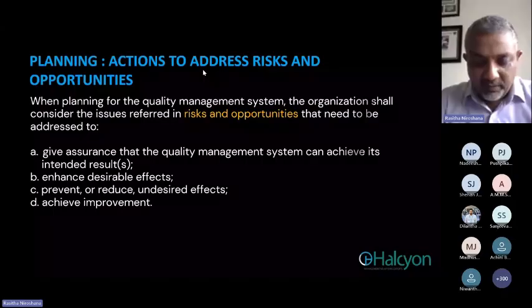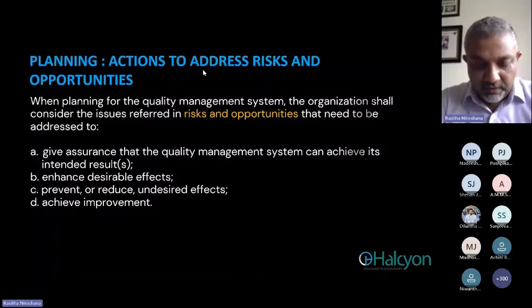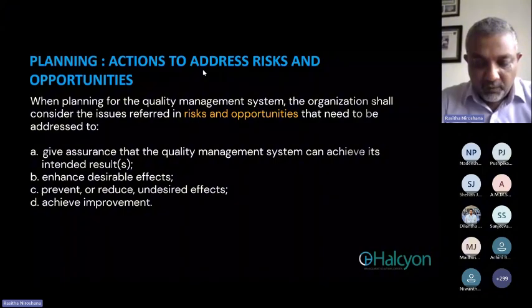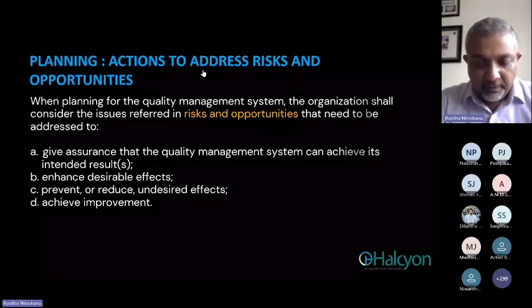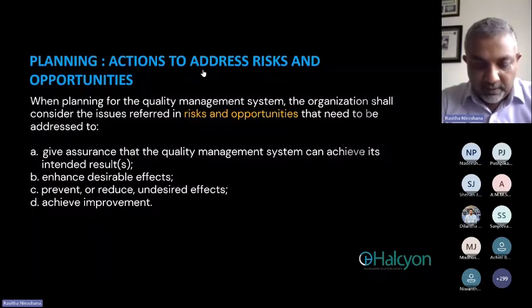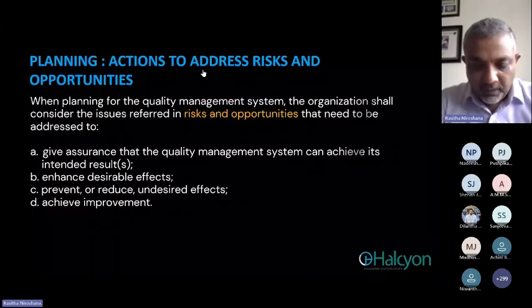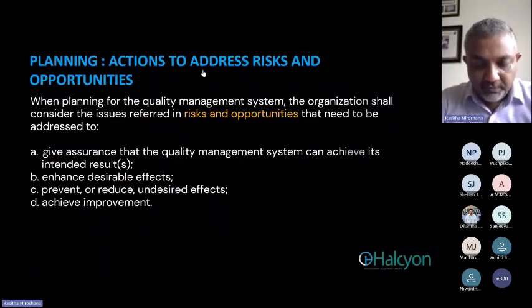The second month will focus on safety training for employees, covering PPEs usage, fire safety, and emergency response, alongside air and water quality monitoring for pollutants such as SOx, NOx, and effluent. In the third month, risk assessment will be carried out in hazardous areas, particularly fuel handling and boiler operation, followed by fire drill and updates to the emergency response plan. The fourth month will introduce a hazardous waste management plan, ensuring proper handling of oil spills and chemicals while also monitoring hearing conservation and ventilation system.